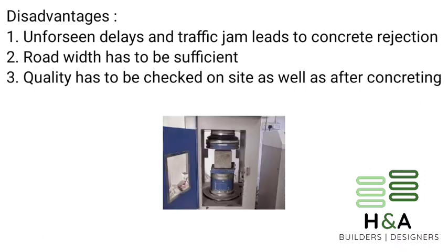and also we have to test specimen concrete cubes at 7 days and at 28 days, to check properly whether the concrete is achieving sufficient strength at 28 days or not. And the next point is that for residential construction, the customer may not get a better idea of the quality of concrete due to lack of site testing facilities. That is, concrete cubes can be tested only after 7 days, 14 days, 28 days. So the customer may not get complete satisfaction.